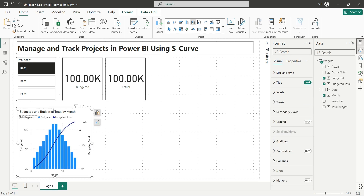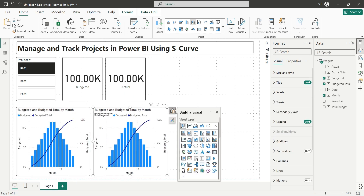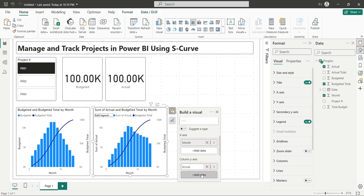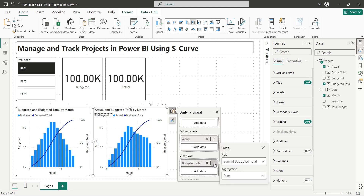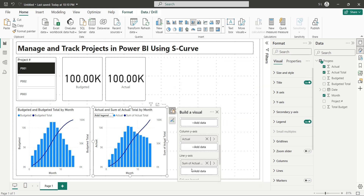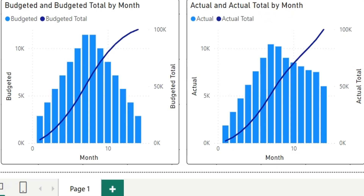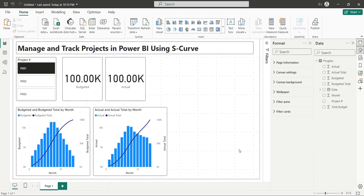Create a copy of the combo chart and place it next to the existing one. Replace the budgeted field with the actual field, and replace the budgeted total field with the actual total field. In the following example, the actual progress could not follow the planned project timeline and it fell back a little in the beginning, which was covered in the final stages of the project, causing the sigma shape of the S-curve to change. This can be further analyzed by comparing the actual and planned progress in a single chart.